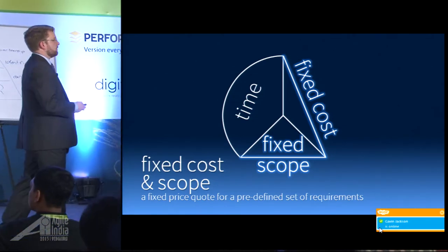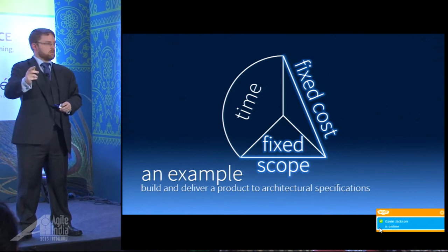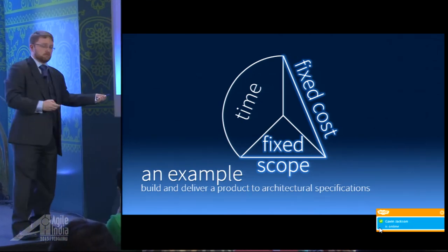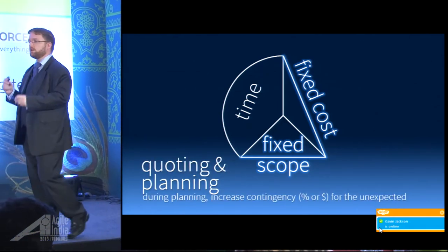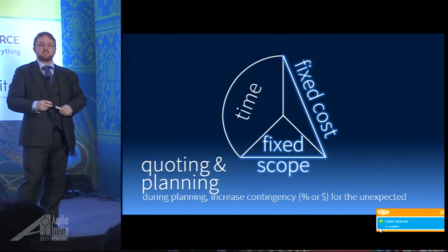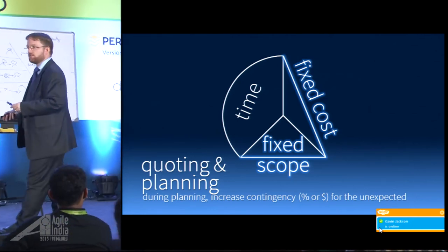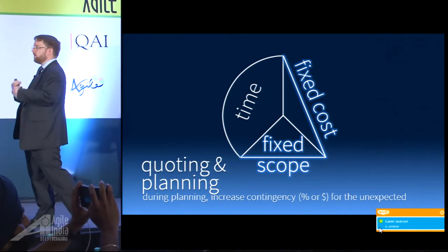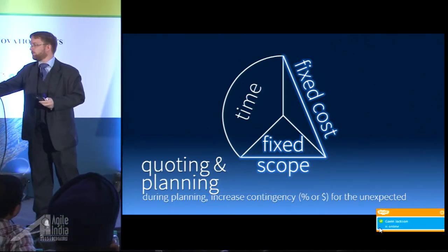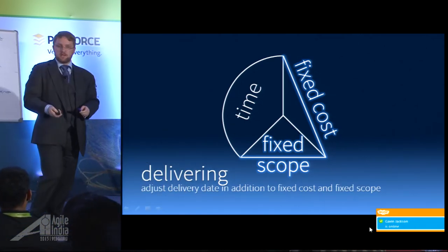Let's look at combinations. Fixed cost, fixed scope — this is terrible. You might have some flexibility in due date, but it's going to cost a million rupees and here is our list of specifications. Does that sound agile to you? No. It's possible to plan it, but you need to increase your contingency. Most organizations run about a 30% contingency. The level of contingency depends on the risk — where the risk is high, you're going to increase your contingency. You're delivering this like a normal agile project, without many changes.